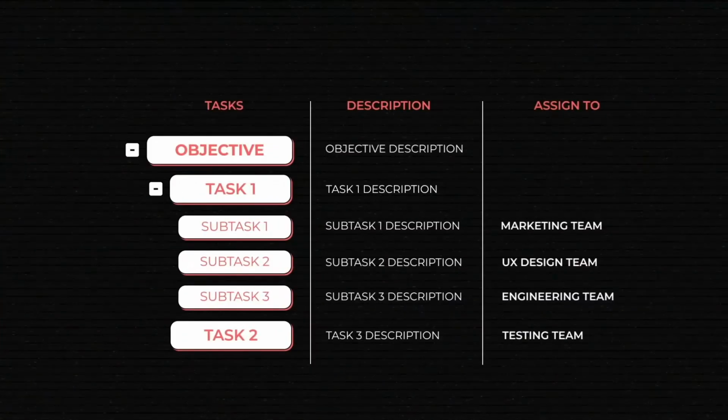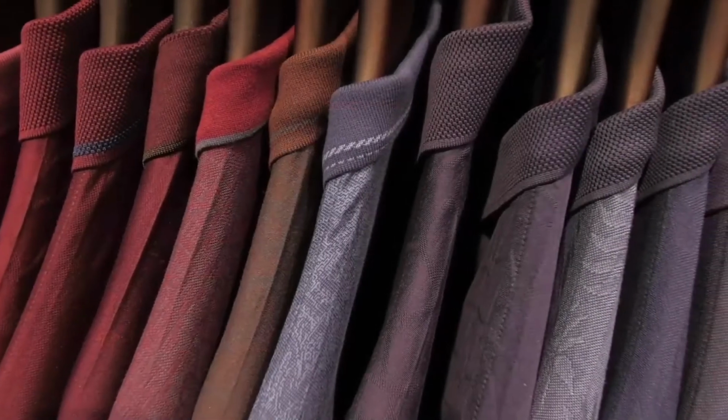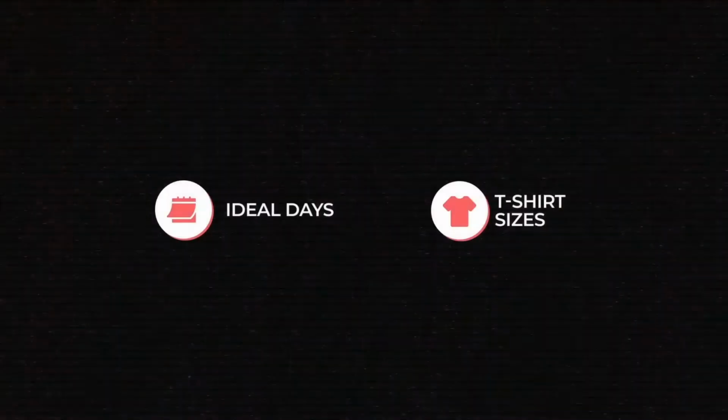You can then go look at the data from past projects, see how many days it took you to finish tasks of similar complexity, and use those numbers for a new estimate. Analogous estimation may work at earlier stages and if you have very little time, but if you require something more precise, you will need other methods.